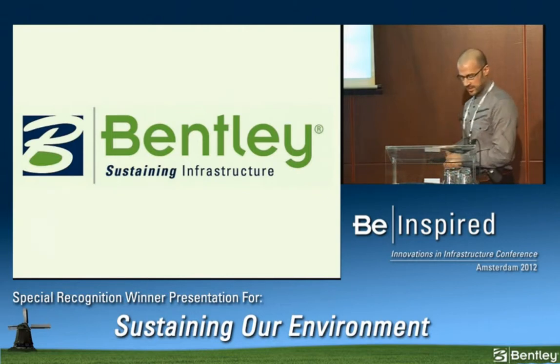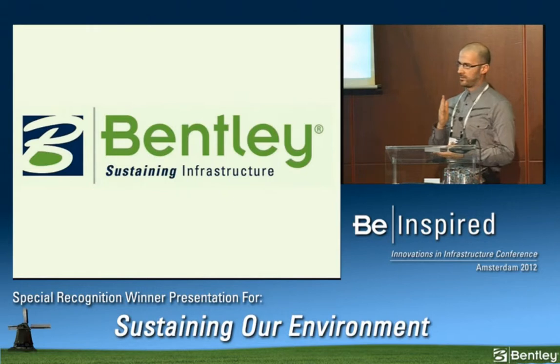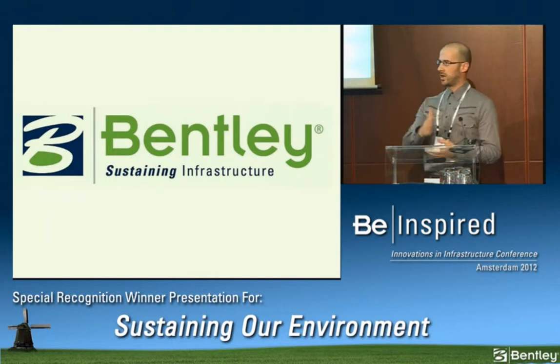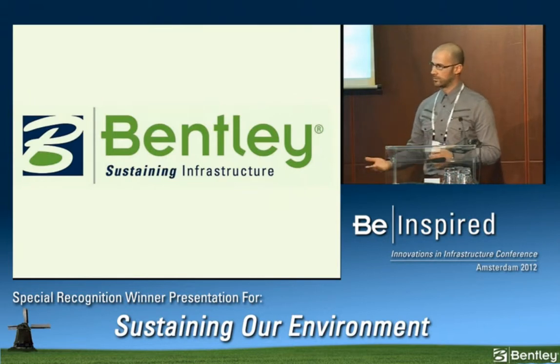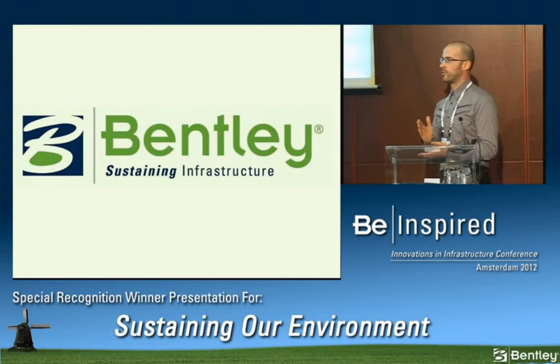Right, and that's something where we manage the deliverable production and that output, and we have that role called the project automation lead, the coordinator and facilitator of the deliverable milestone generation. So there reaches a point where our scheduling, our managers plan cutoffs and pause periods in order to produce those milestones for turnovers contractually to the client, and at those instances we have breaks in time.